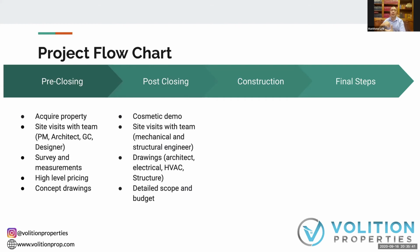So let's say you want your flooring to be $10 a square foot, but you want your backsplash to be $20 a square foot. Without all that information on a detailed line by line basis, how could you quote, right? You can't actually generate an accurate quote. And you need drawing sets because you need to know, hey, my island is going to be 15 foot long, or hey, my island is going to be 2 feet long, right?